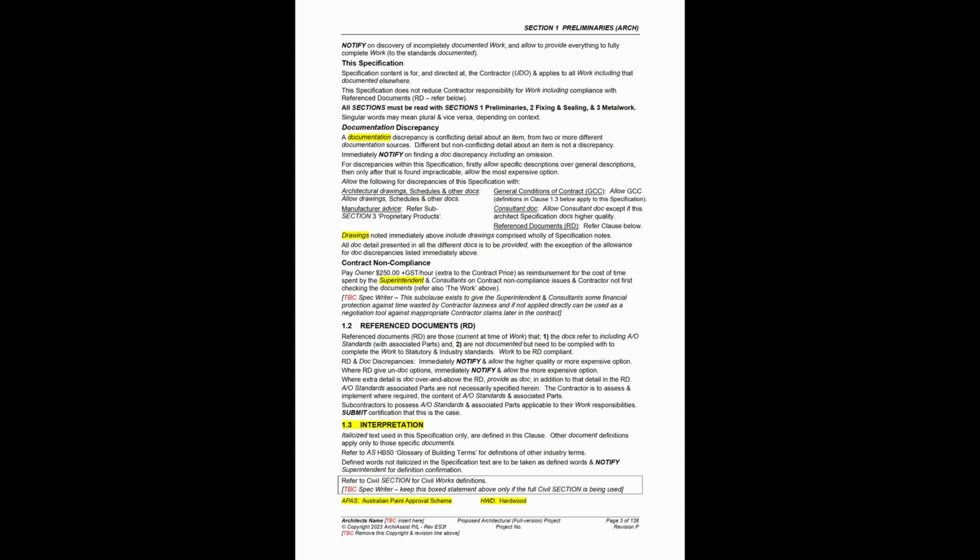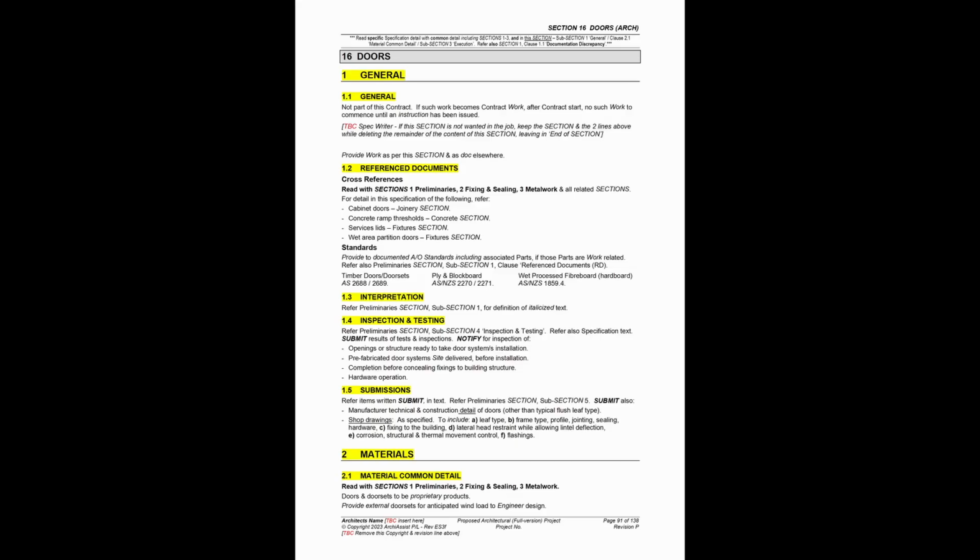This is done in industry contracts and in the NCC, but is rarely done in specifications, which is unacceptable. You need to know a defined word when you see it. Builder administrative items are submissions and notifications, identified by the words notify and submit, written italicized, bolded, all capped, so they stand out. Hold and witness points are not used. Instead, the superintendent is timely notified of a future inspection and has the choice to act on it.